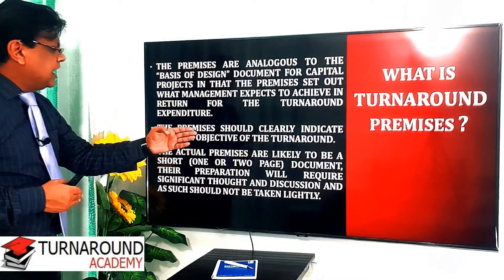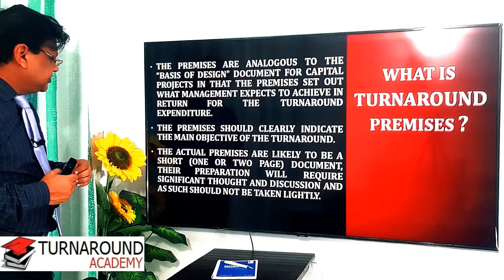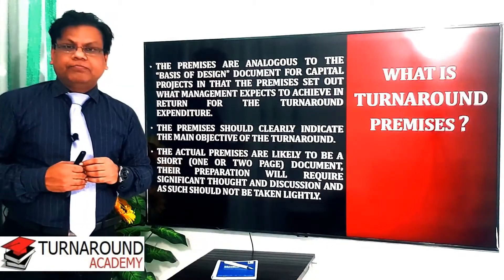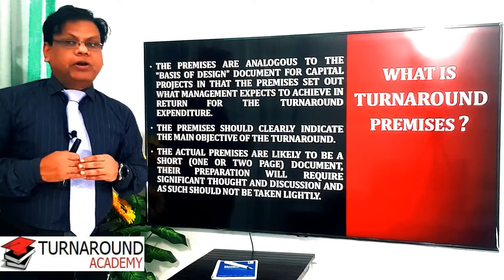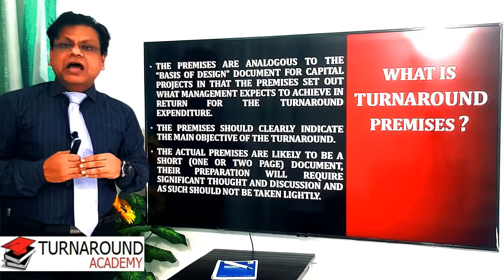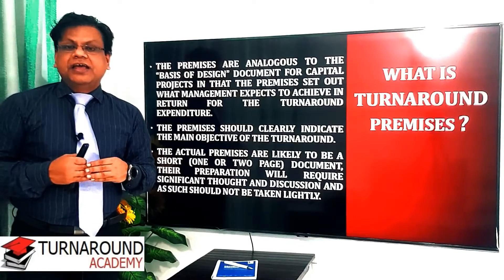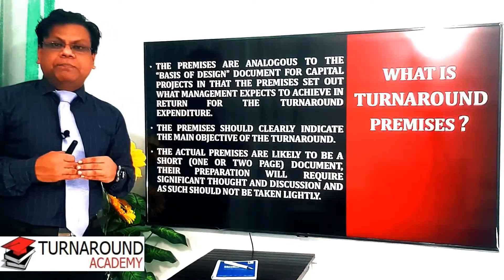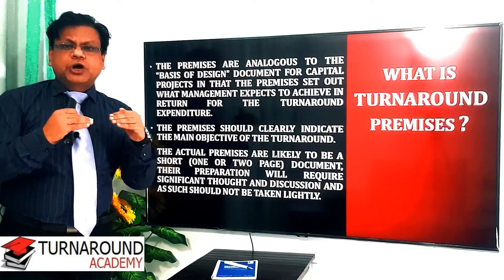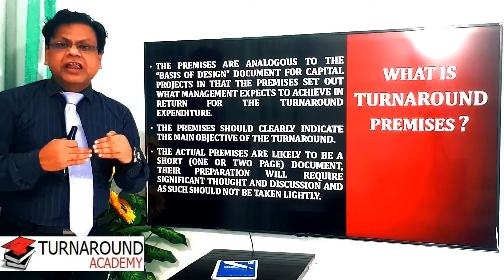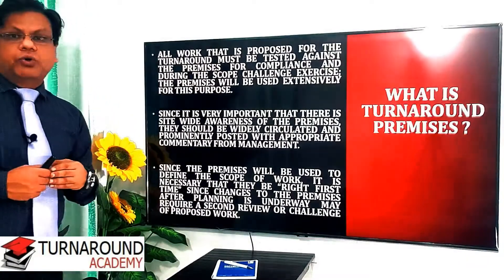The actual premises are likely to be a short one or two page document. Their preparation will require significant thought and discussion and should not be taken lightly. This is the first milestone and will be the road map. Management takes the preparation of turnaround premises very seriously. Keep in mind: while preparing the turnaround premises, don't make it very big — maximum two to three pages. Include only major milestones, major objectives, major policy decisions, and budget requirements.